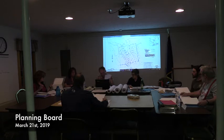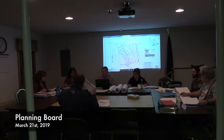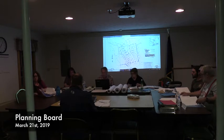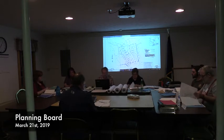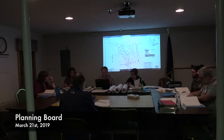So I think the goal tonight was to approve the application to send it to Southern Maine Regional for review. And then we can work with the planners there and Brad, and go through it all, and come up with a list of things they need to correct, if there's any, to make sure it's in compliance, and then they can come back and make their changes, and come back to us, and go from there.